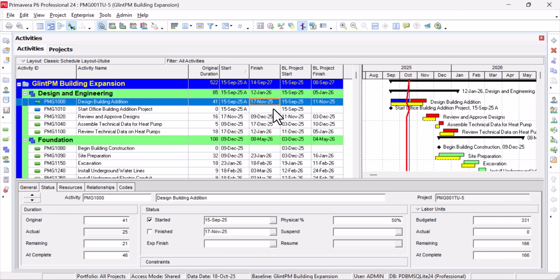If something is not done, we are not going to finish these activities as planned, and it's going to impact other succeeding activities. As you can see from the Gantt chart, it is critical. So if it's critical, it means this delay can further cause a ripple effect and delay other activities.